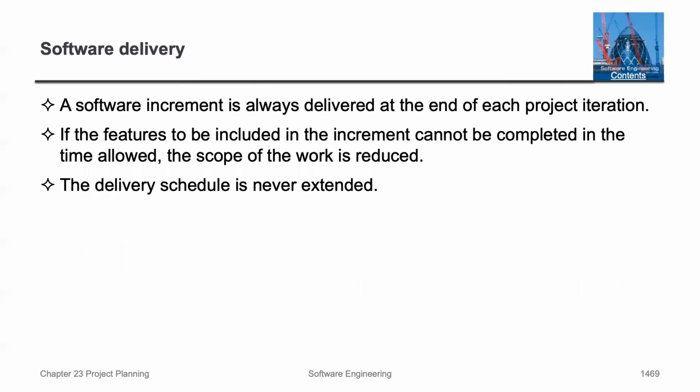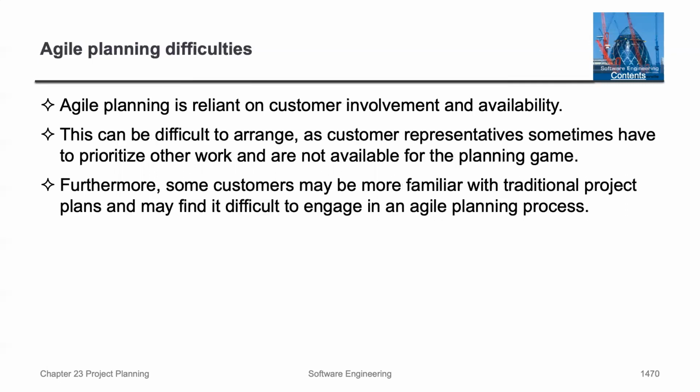For software delivery, a software increment is always delivered at the end of each project iteration. If the feature to be included in the increment cannot be completed in the time allowed, the scope of the work is reduced. The delivery schedule is never extended.